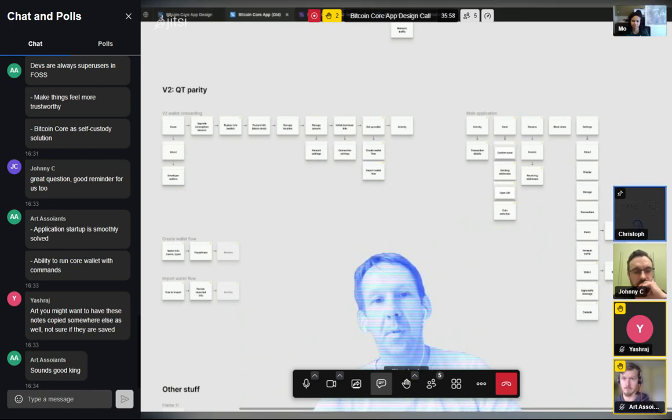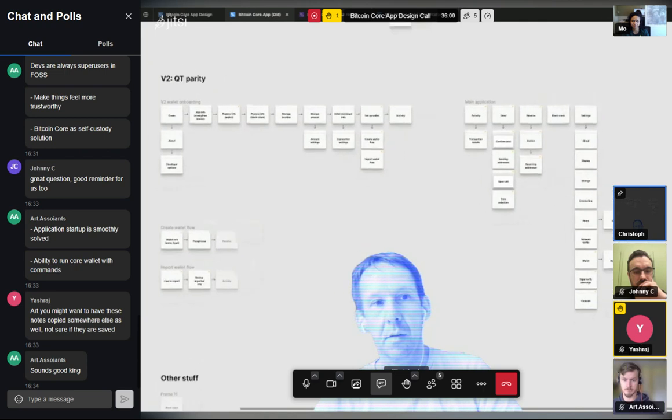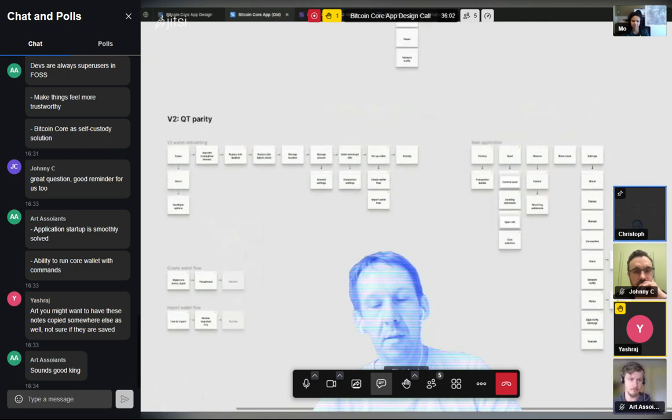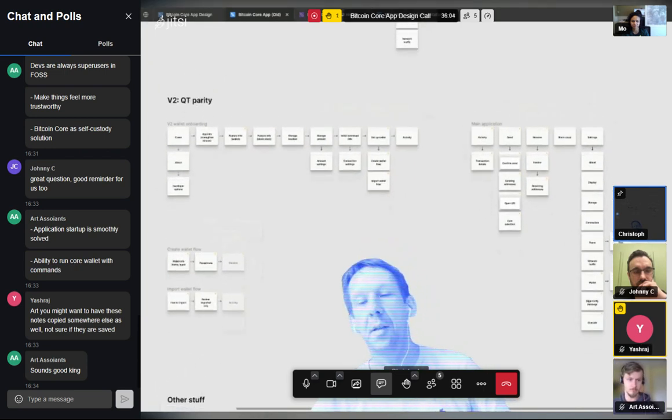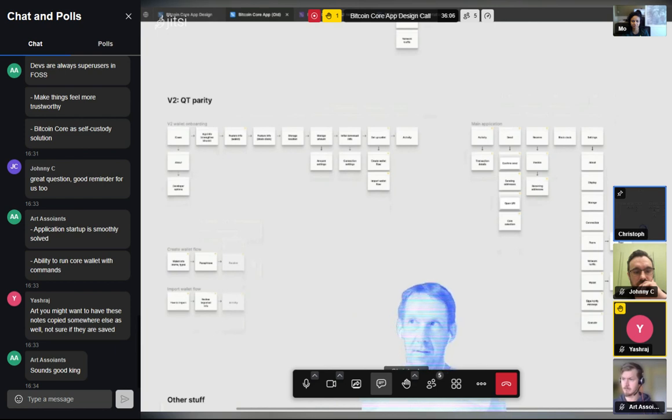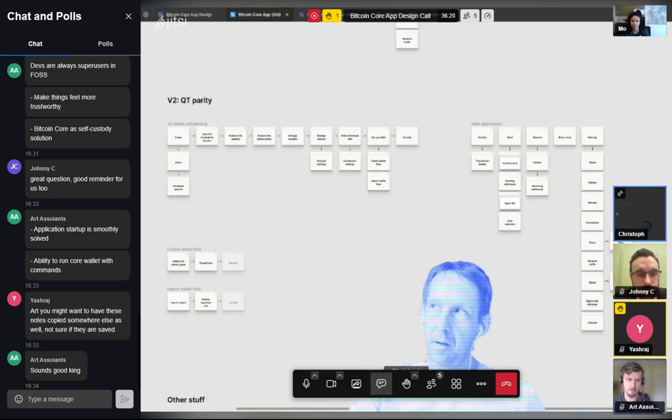Yeah, and I think the design and development process is another thing. Ideally, we set our goals, the big milestone, we all figure that out together, we decide on it, we figure out our sub-milestones, we figure out what's next, and then design should be ahead of development by a good amount. And not just design in isolation, but as a conversation, it's planning.